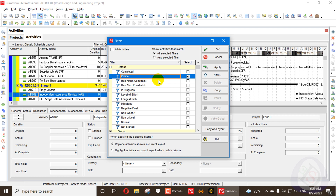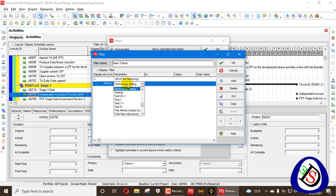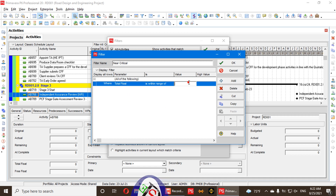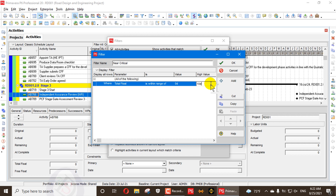Now let's go to our next concept: near critical. Near critical is not based on your schedule settings — it is a filter you create yourself. I will uncheck this box and create a new filter with the name 'near critical.' Here I set total float within the range of 0.01 days to 10 days. Near critical activities are those close to zero float that can be delayed up to 10 days, and are considered the most critical activities after your critical activities.